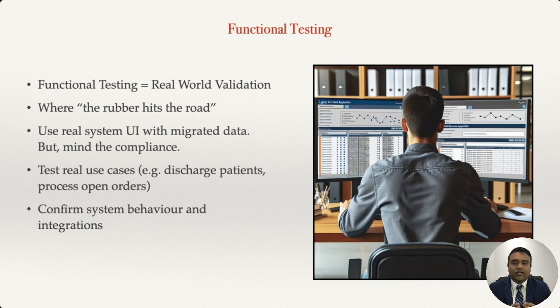Functional testing of data migration can be combined with system integration or user acceptance testing, which are part of the larger change and part of the test plan for deployment of the new business application. So check with your project manager and the program manager and work on the possibility of integrating the data migration functional testing with user acceptance and system integration.